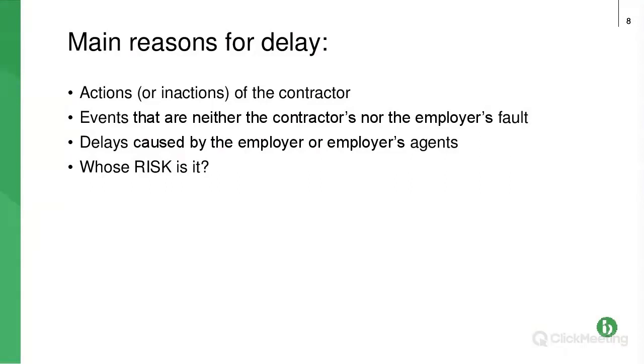Be careful though, because as contracts get trickier and trickier in construction, what you typically see is some risks where it is under the employer's control, but the risk is specifically stated as belonging to the contractor. That's not in your standard JCT or NEC, but we see rafts and rafts of amendments to these contracts nowadays. So just be careful that you're not picking up risks that really should be the employer's risk.